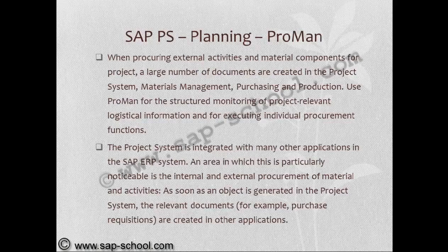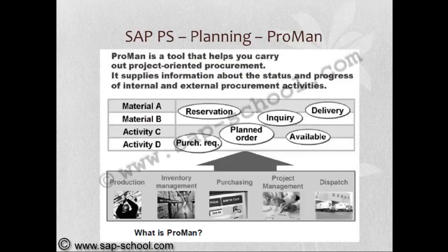The project system is integrated with many other applications in the SAP ERP system. An area in which this is particularly noticeable is the internal and external procurement of material and activities. As soon as an object is generated in the project system, the relevant documents are created in other applications as well. So Proman is a tool that helps you carry out project-oriented procurement.